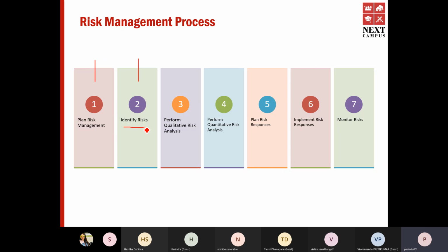So Harindra, you said earlier that in your organization, you categorize risks as high, medium, low. So that's a qualitative risk analysis. In qualitative risk analysis, you look at the risk from the outside. You would categorize them as high, medium, low, critical, in different formats, or you would rank the risks. Basically, you would have segregations for the risks. So that's your qualitative risk analysis.